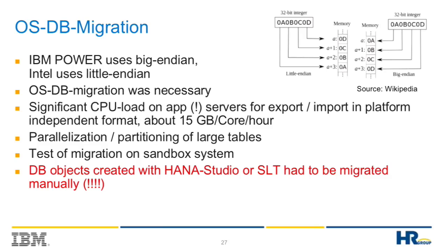So we developed this in this project as well, but we have to migrate that system because we use different endianness. x86 is little endian, and HANA on Power at this time, until we get SLES 12, hopefully by the end of this month, is big endian. So we have to do a real SAP heterogeneous system migration. We did that and we got some really bad surprises.